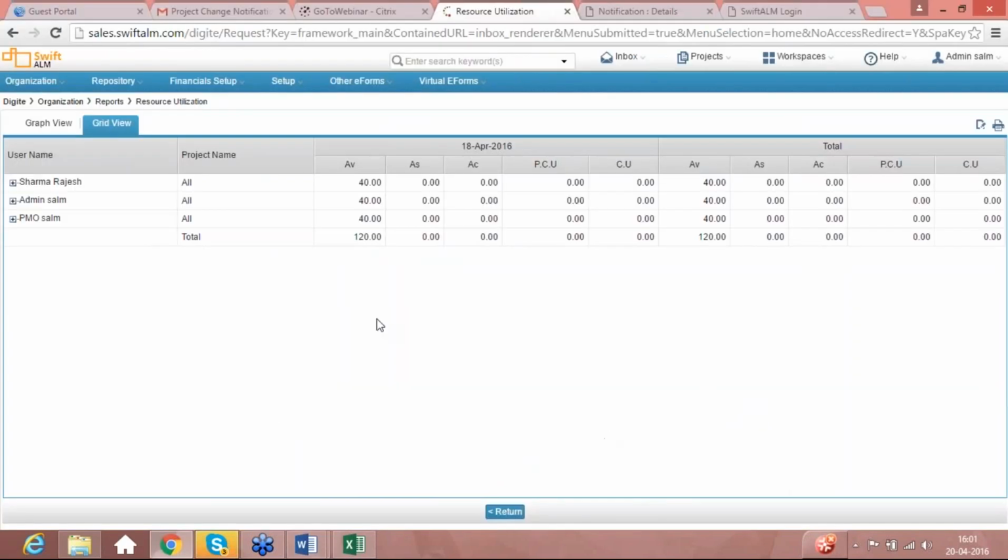So here, how does the available hours get computed? The available hours get computed based on the resource calendar. Each resource has a resource calendar associated with team members. By default, the resource calendar is used to add exceptions, saying that you are not working. If there is no exception for a day, you are considered for that day, and based upon the number of hours that you're supposed to work for a day, your availability at an organization level is computed.